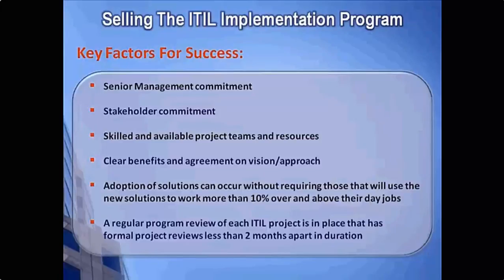So to help with that, you have something called the DICE model, D-I-C-E model, which is a spreadsheet. I just want to point out that it is included with your program materials that you can download, and it's a good way of looking at your project from day one, before you even start, to predict whether your project is going to be successful or not. And if the model shows that it's not going to be successful, you can take some early actions up front to try to ensure that success will happen.